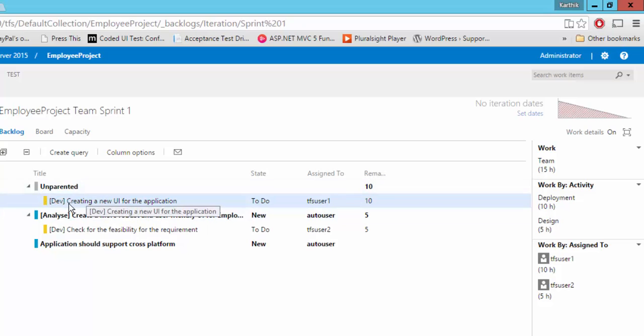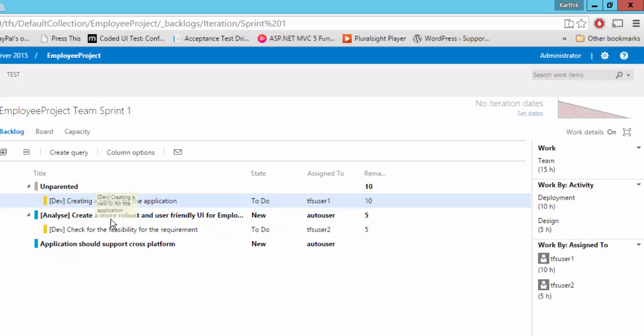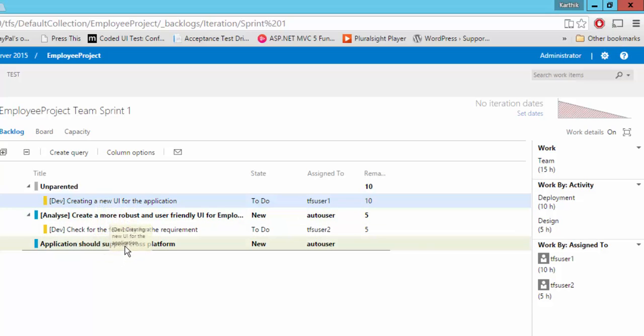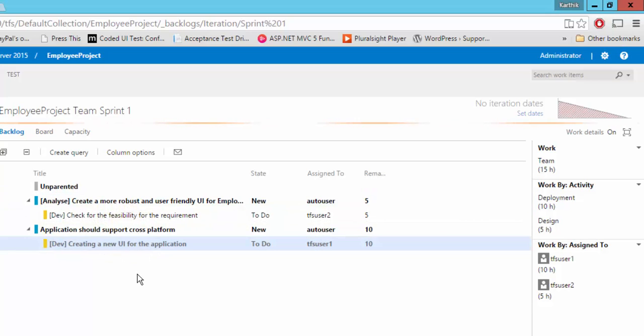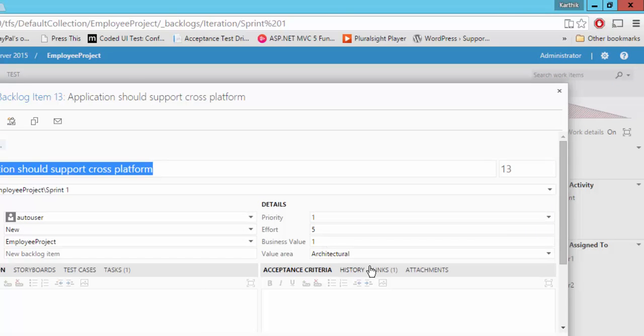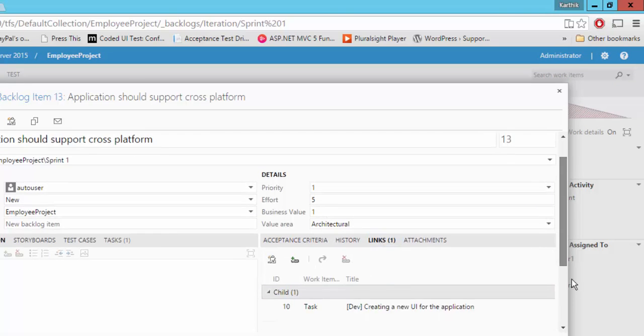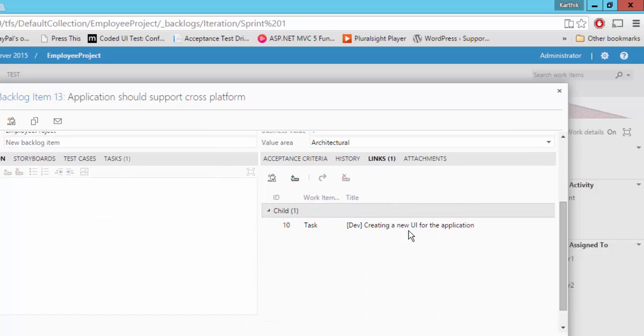There is no parent for this particular task and it is unparented. So what we can do is if let's say I want to map this to our existing PBI, then the easiest way I can do is I can just drag this and I can drop this to a particular PBI and it will become a child item of this particular PBI. So now if I open this particular PBI and if I go to the link, you can see that there is a child item.